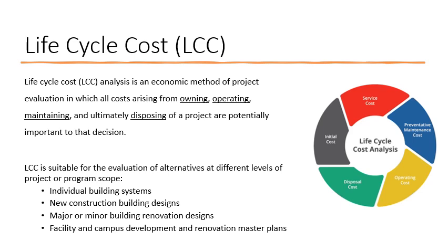Now we can have a better understanding of what LCC means. LCC or life cycle cost analysis is an economic method of project evaluation in which all costs arising from owning, operating, maintaining, and ultimately disposing of a project. Typically, in LCC calculations, we compare two different projects to make the best decision and to select the best project which has the lowest LCC over the time period of our study.